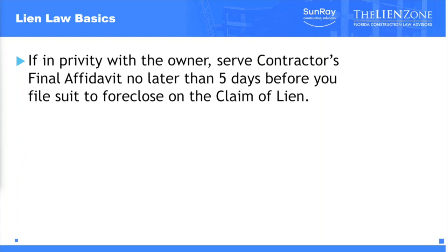If you have a direct contract with the owner, then you also have to serve what's called a contractor's final affidavit no later than 5 days before you file a lawsuit to foreclose on the claim of lien.